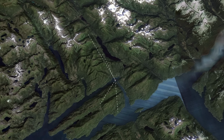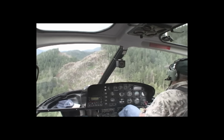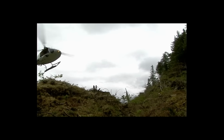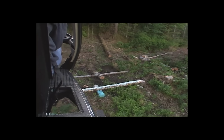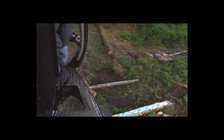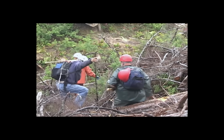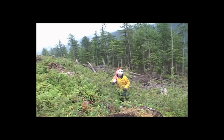Clearing crews are the first to go out, flying to pole sites both close to Anchor Pass and also at the beginning of the route down at Swan Lake. Where the helicopters can't find a flat place to land, 2 split logs were set up. Then, if the helicopter couldn't actually land, it could place a skid against them and hold station while crews jumped in or out.